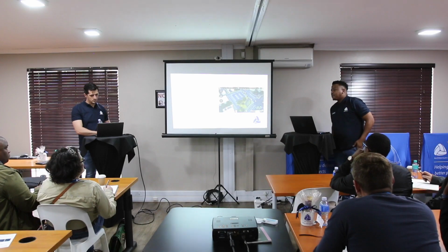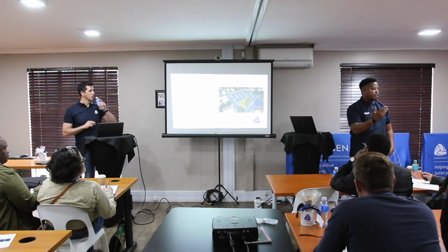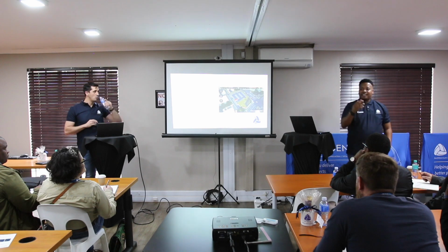When BIM came through, as an application engineer, we were all excited, telling consultants that you can set up a 4D scheduling file in Navisworks, bring in the project plan from the project manager, attach it to your BIM model and keep track of what's happening on site. The problem was it became very resource intensive and consumed a lot of time. Most consultants wouldn't hire a specific person to just sit on Navisworks, go to site, check how far the project plan is, update the project plan, come back to Navisworks, and then update the file again. So it became useless and kind of just stopped there. I still loved it anyway.